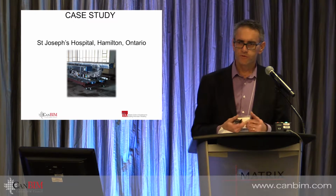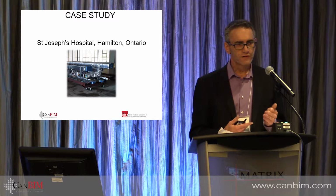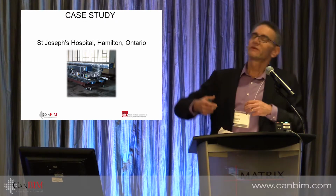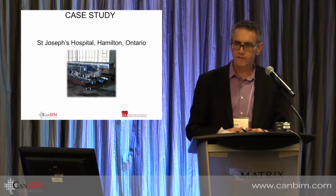And what we saw with that was what would typically take them 4 weeks to stick build on site, they had installed in under 4 days. They also did it far safer because we didn't have everybody climbing up ladders and doing one of these without their hard hat on, trying to get to junctions. It was all done down at ground level, far more ergonomically correct there.